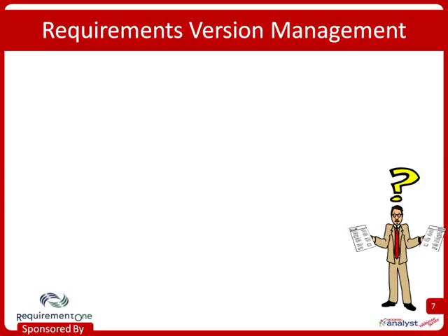You know, it's possible that you've had a conversation like that, and so what happens is that problems arise anytime the project team members are unknowingly working from different versions of the requirements. And because we know they're going to change, we're going to have to be able to know the version of every requirements document and ideally of every single individual requirement at all times. So what this means is we need to put our requirements under version control.